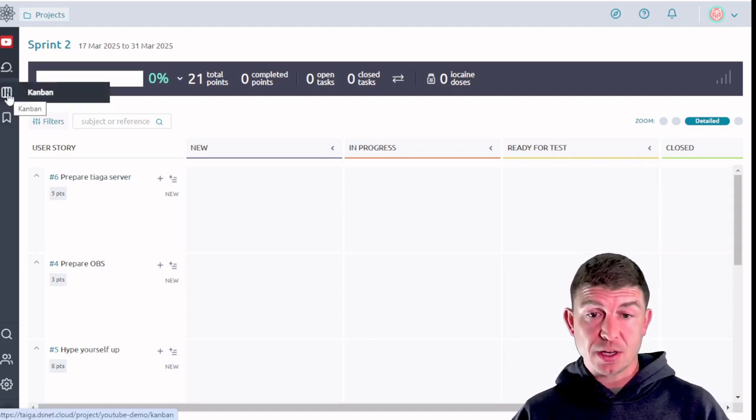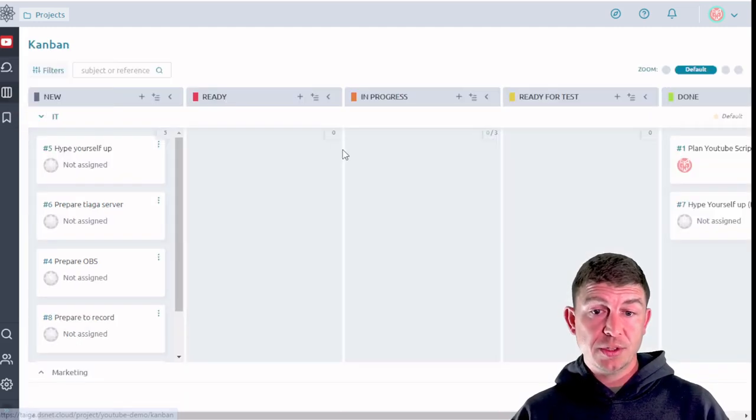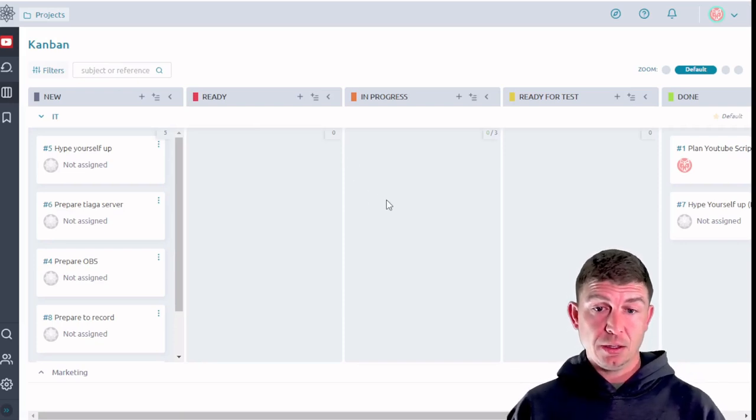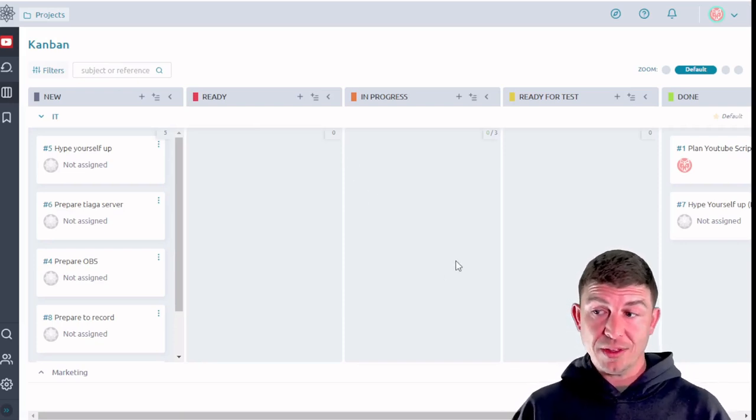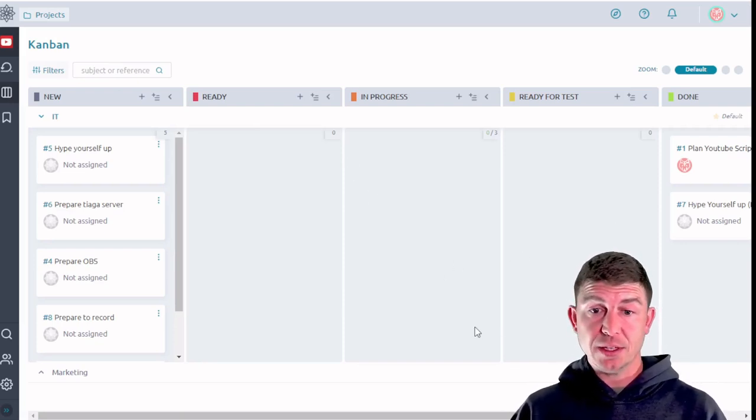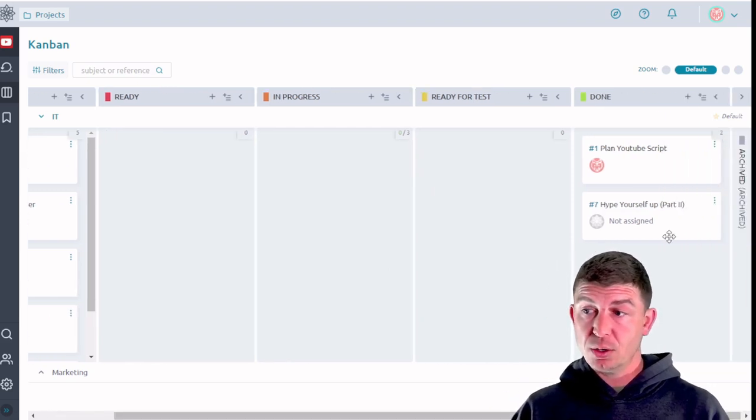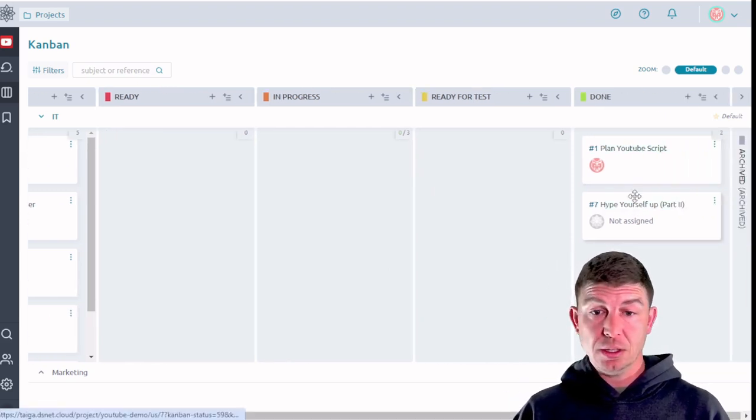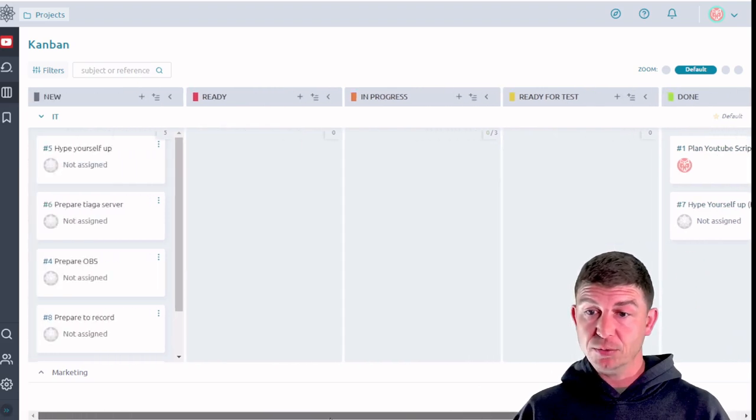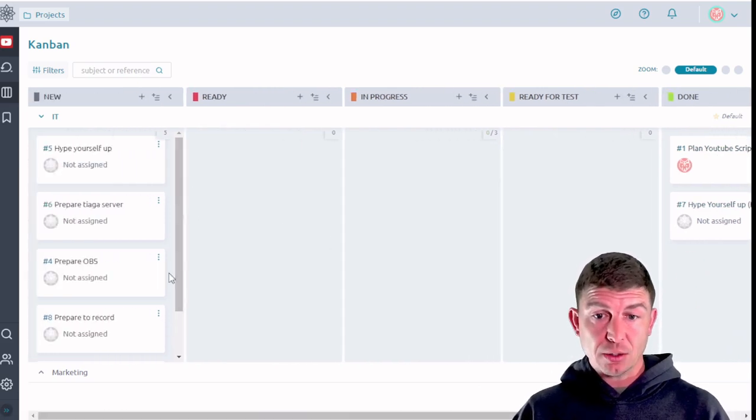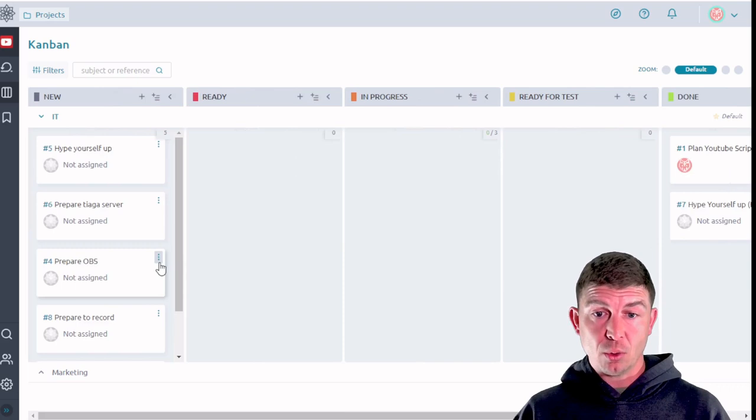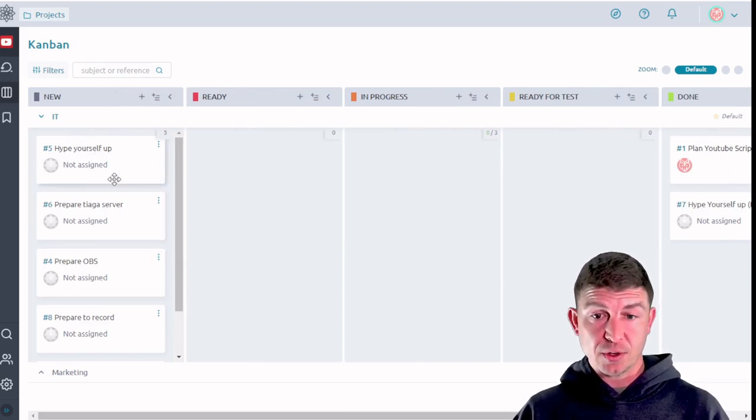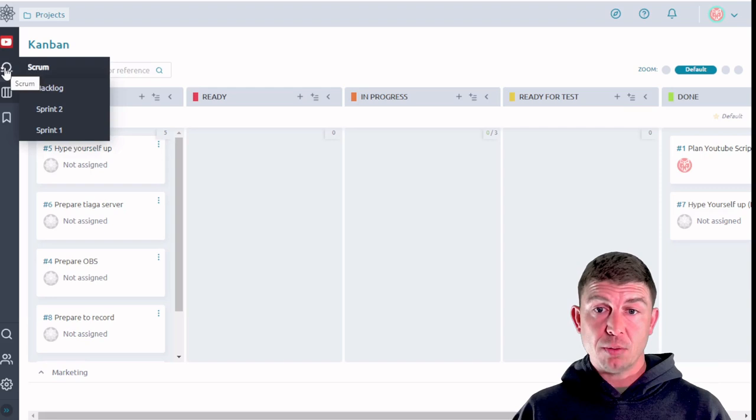As we move various subordinate tasks through the phases of completion from this task board, if we go back to the Kanban board, you'll notice that all of the changes we made within the sprint module are reflected on the Kanban board. Over here we have plan YouTube script is complete, hype yourself up is complete, so on and so forth. As changes are made here in the Kanban board, they will reflect on the scrum board and vice versa. So let's go back to the scrum board.